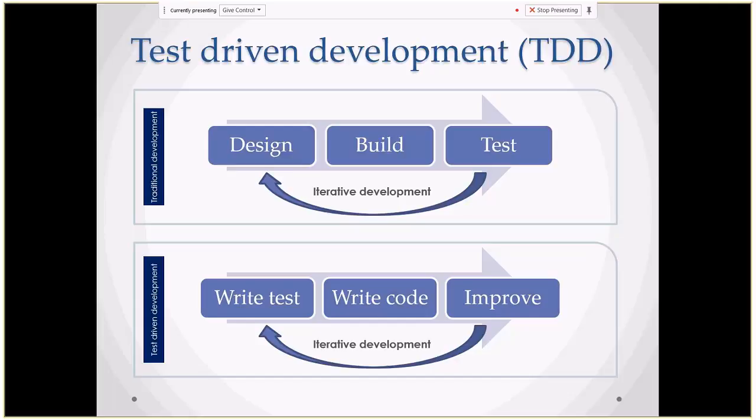Then we'll be checking, as Dilanka said, there's a demonstration at the end of the sprint. In that, we will see what improvements we need to bring in to improve the code, or if the client agrees that they need to change some functionality or UI, we can accommodate that. So all these things will be rotated as iterations, and it is time-boxed for 2 weeks. That is called a sprint.